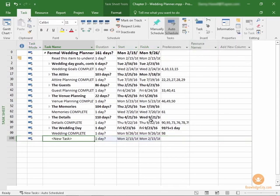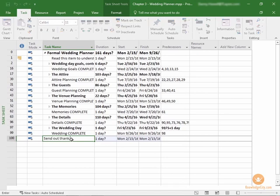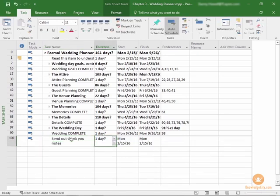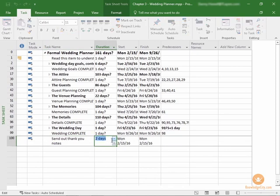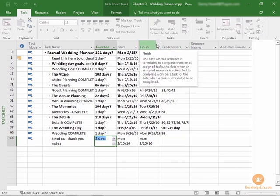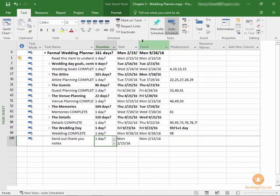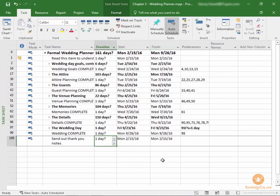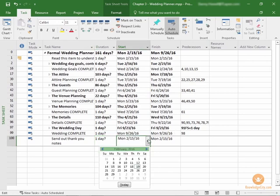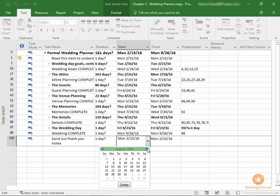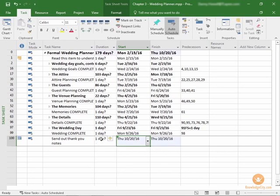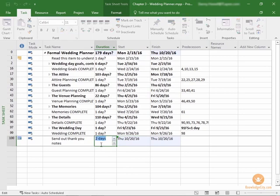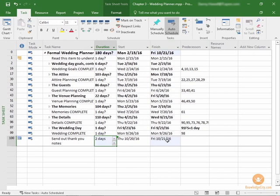Microsoft Project 2016 has given us a new task line filled with information that it expects you to change. We can just start typing right in this field: send out thank you notes. How long will this take? My guess is it may take two days. One day to write the thank you notes, one day to get them in the mail and send them out. Since we want to do this after the wedding is complete and we're going on a honeymoon, let's schedule it for middle of October 2016. We're going to schedule the start for October 20th and two days. When I change it to two days, the finish date changed to October 21st.